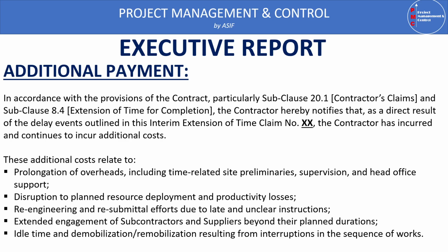In accordance with the provision of the contract, particularly subclause 20.1 (contractor's claim) and subclause 8.4 (extension of time for completion), the contractor hereby notifies that as a direct result of the delay event outlined in this interim extension of time claim number X, the contractor has incurred and continues to incur additional costs. These additional costs relate to prolongation of the overhead, including time-related site revenue, supervision, and head